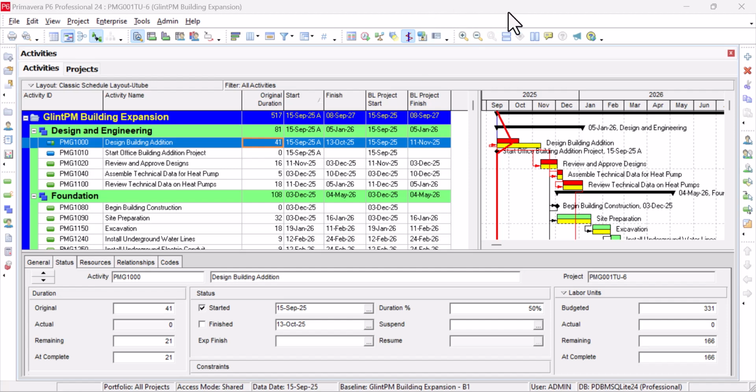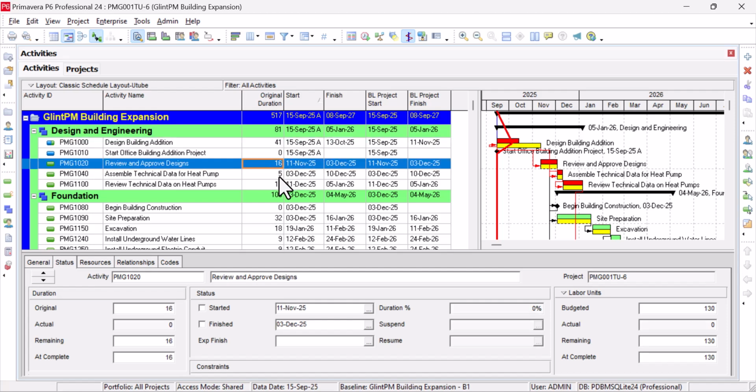Because take note, there's an important thing I'm going to show you, and that is called the data date. Right now, the data date of this project is still December 15, which is behind us. Usually, it's not the best. Depending on the reporting cycle of the project, we will be updating it by that period. For this project, I want to assume every week. So every Friday or Saturday, I need to change my data date to the latest date after updating the schedule. For your project, it might be 1 month or whichever duration has been agreed.